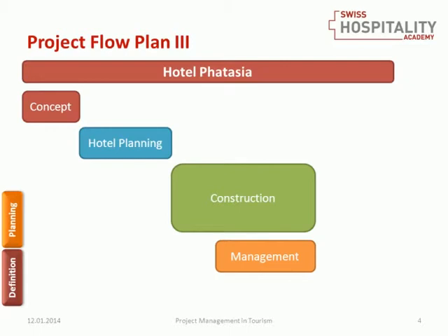The management: hiring staff, hiring the management, start sales activities, train staff, make PR. This can be in parallel to construction. We don't have to wait until construction is finished. If we first finish the hotel and only then start to hire staff, the hotel is finished and we have to wait a whole couple of months, which is lost money. So we can do it in parallel.